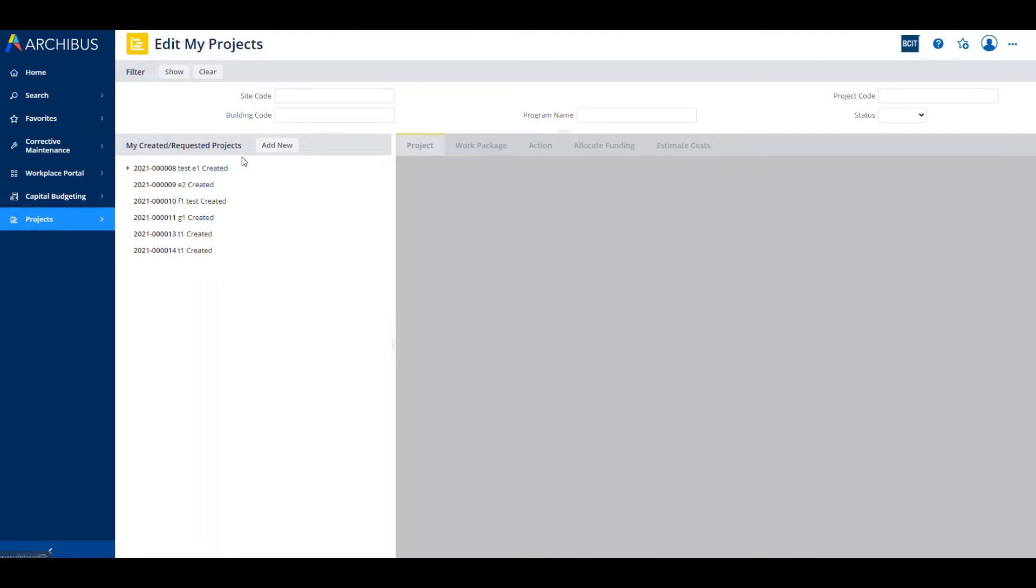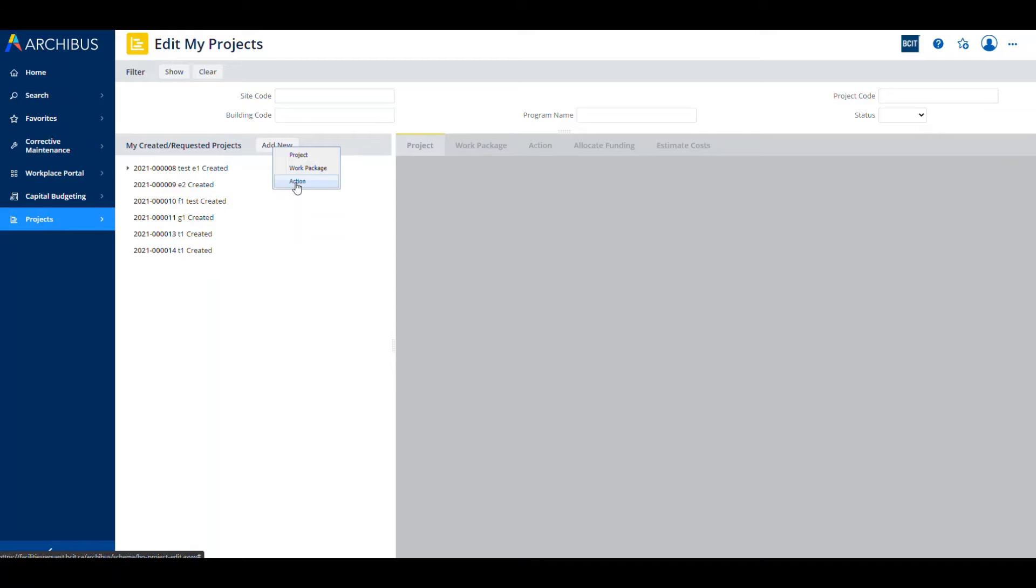When you click Add New, you're going to be presented with three possibilities: project, work package, or action. And that is a good point to talk about the hierarchy in Archibus. The hierarchy is set up with the top level as a project. A project has work packages in it, and work packages have actions, which people often refer to as tasks within them.